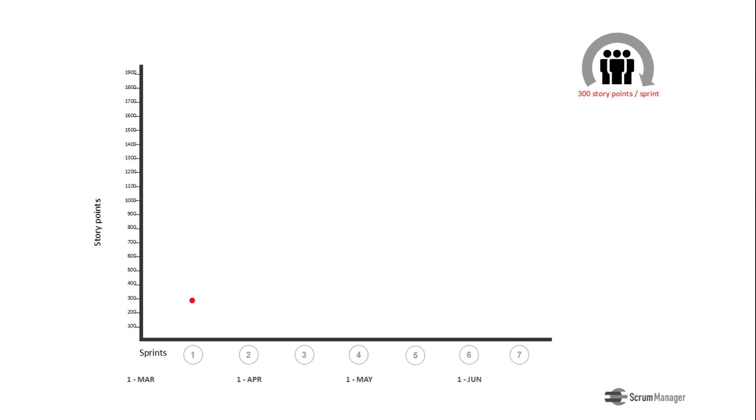So, in two sprints we can achieve 600 points, in three sprints 900. This way it's easy to draw the line of a predictable speed of our project.